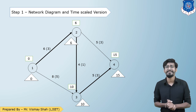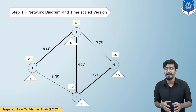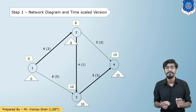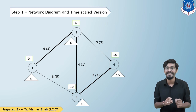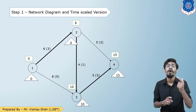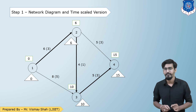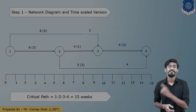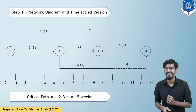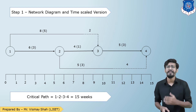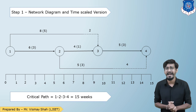Now let us see the time-scaled version. In a time-scale diagram, the critical path is represented by a straight line, and non-critical activities are represented above or below the critical path. The critical path 1-2-3-4 has been represented on a straight line, and activities 1-3 and 2-4 are represented above and below that critical line.